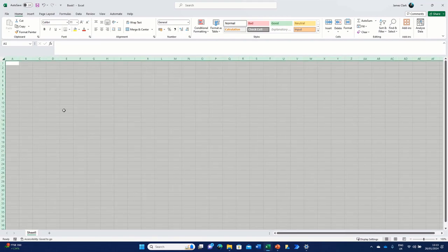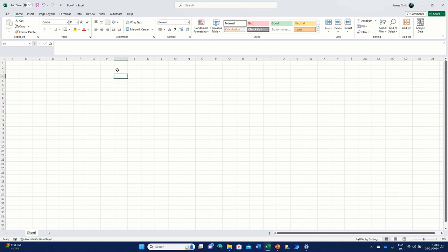Let's just bring this back to normal column width. I start over here. So let's just put 5 columns in there. For example, I'm going to have an ID, a name, description, mitigating actions, and an action owner. Okay, so that's the basic 5 columns of a risk register.